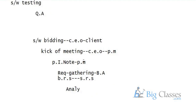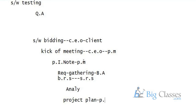After analyzing the documents, the next stage is planning. The project manager prepares the project plan. This includes selecting the team — how many developers and testers are required, what hardware and software resources are needed, and what configurations are required. Everything in the project plan is prepared by the project manager based on the requirements.